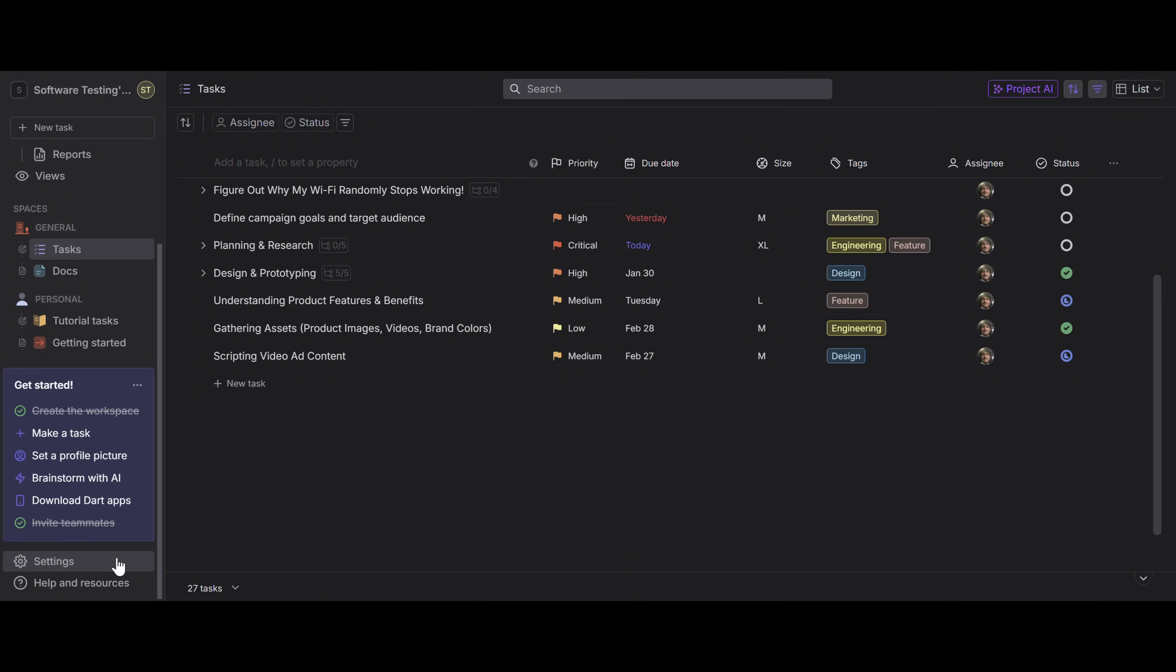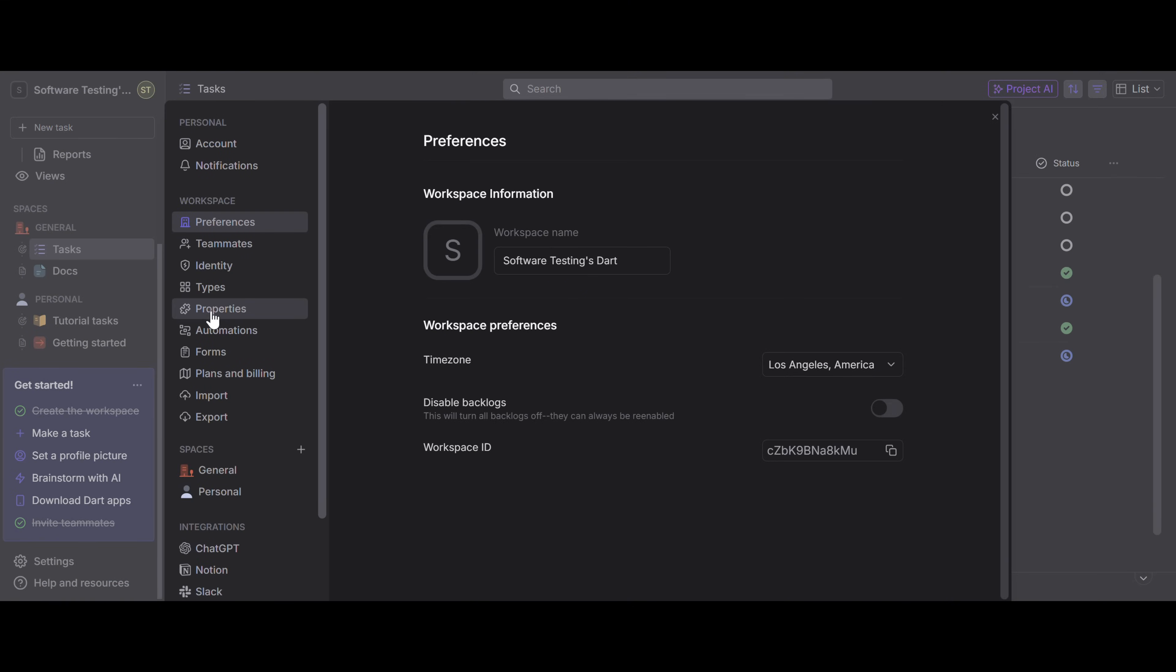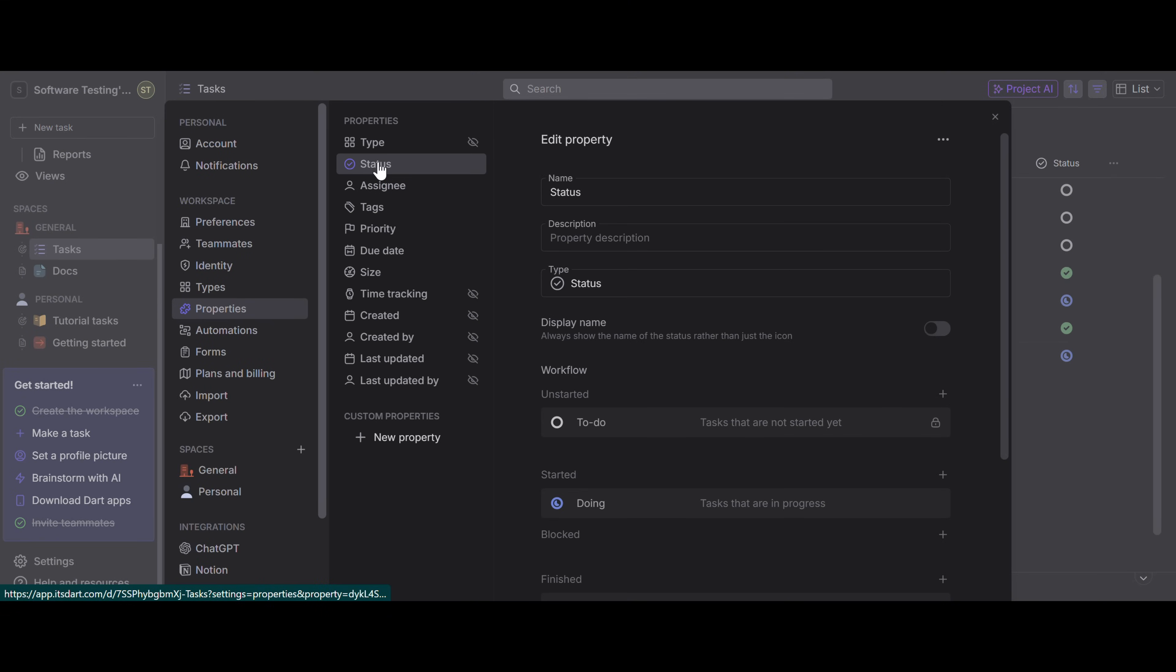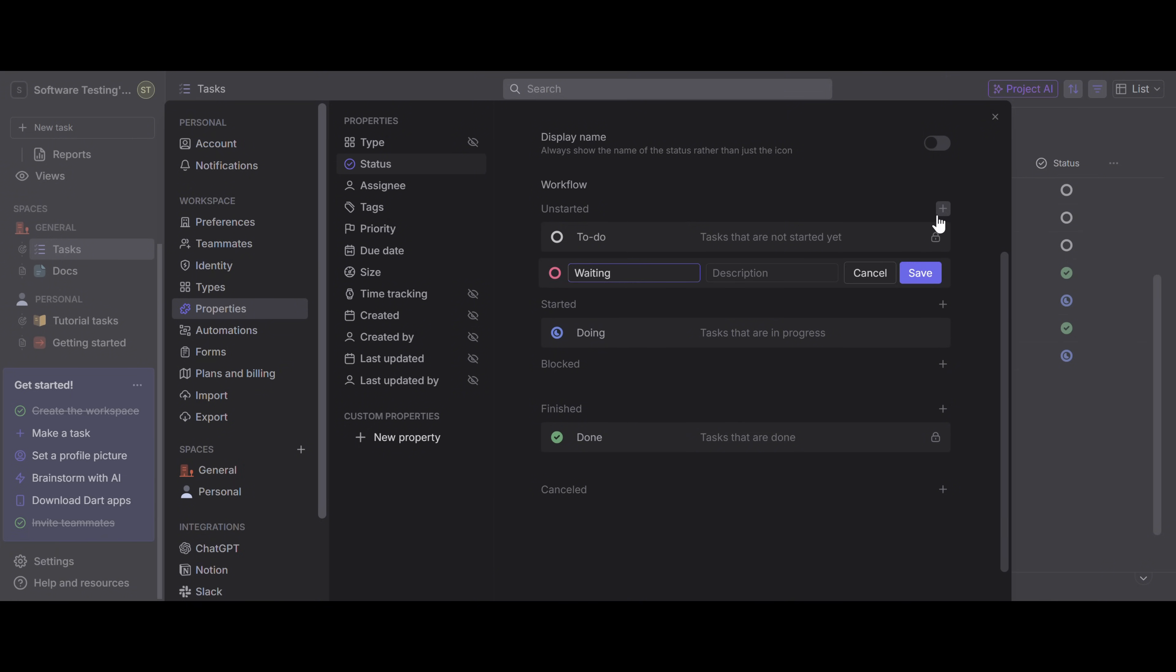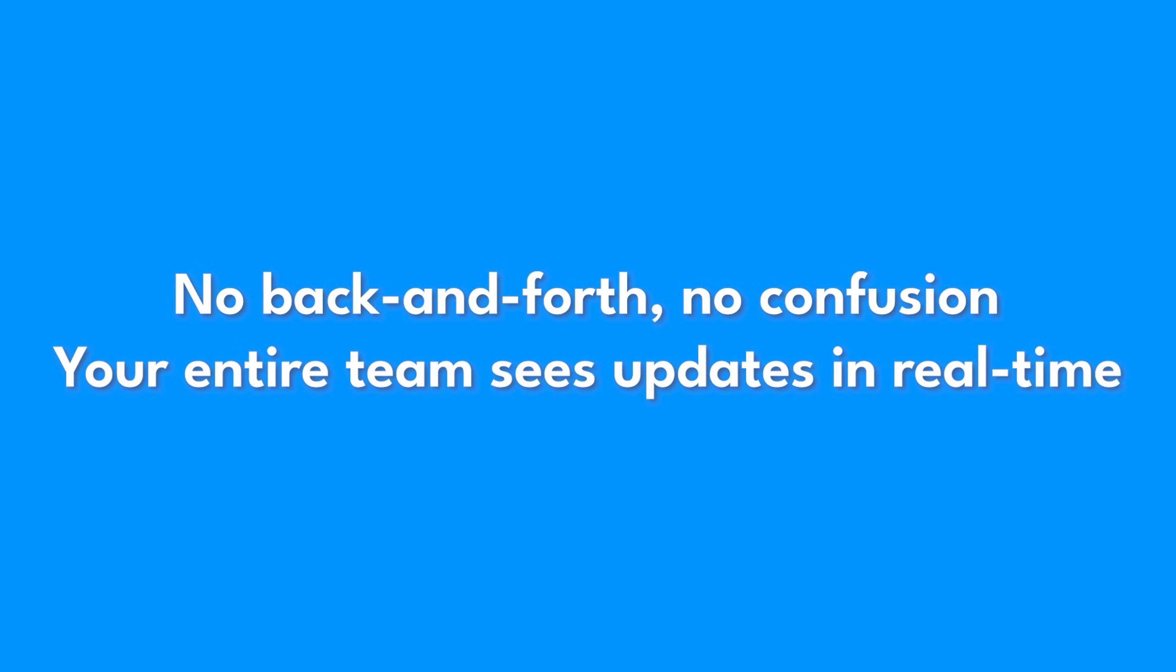You can also fully customize and configure your statuses to meet whatever your needs are. Just go to Settings, then Properties, then Statuses to create a custom status such as Waiting, Cancelled, or In Review. No back and forth, no confusion, your entire team sees updates in real time.